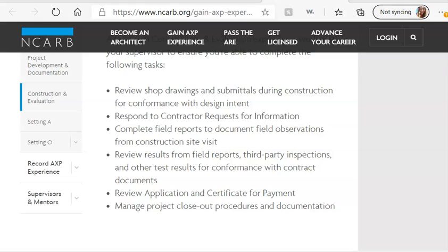This is reviewing payment applications. So a contractor will submit to you documentation saying, okay, I performed this, this, and this, and it's about this percentage of this portion of the project, and this is the fees we're expecting, and then you have to approve it, and then they get paid that portion of the work. And sometimes it's done weekly, sometimes it's done monthly. It all kind of depends on the client and how they do it. And understanding where they should be based on what they're saying.